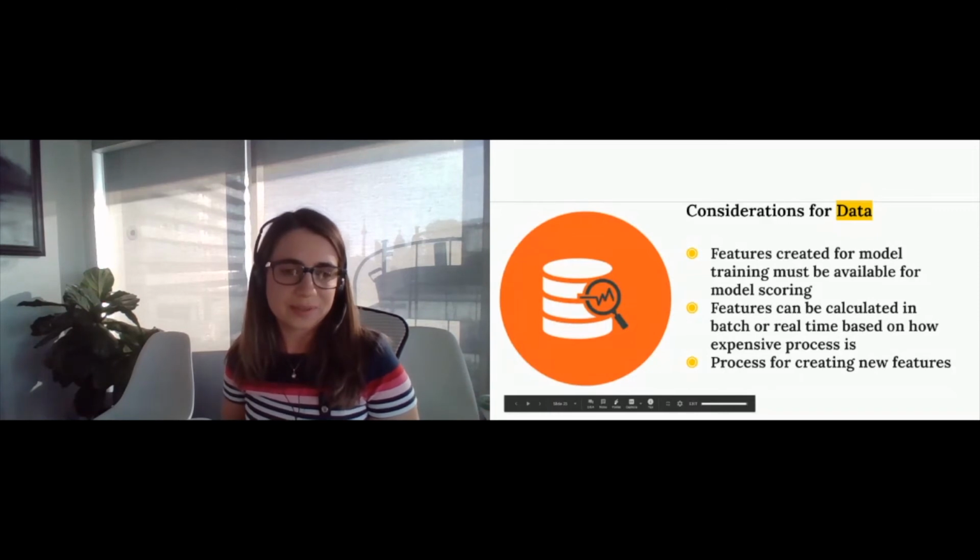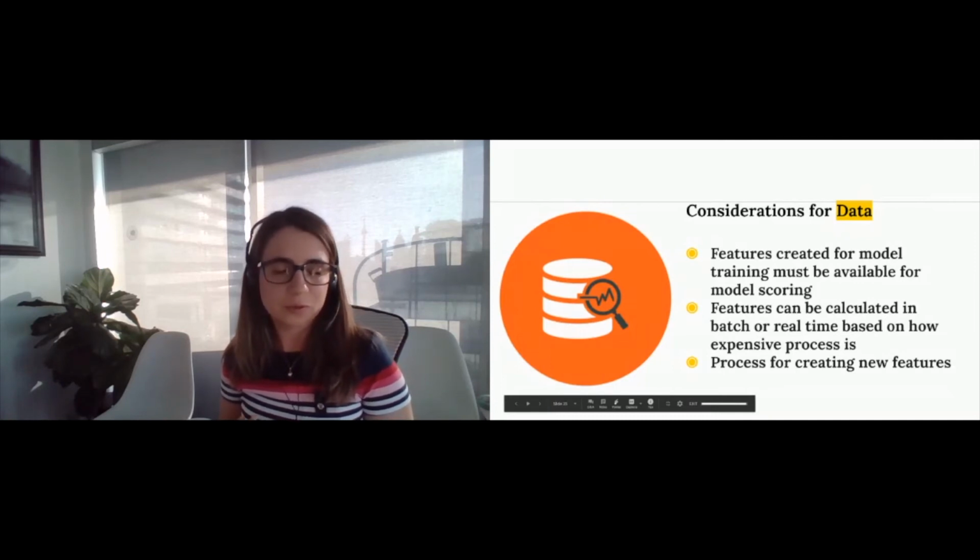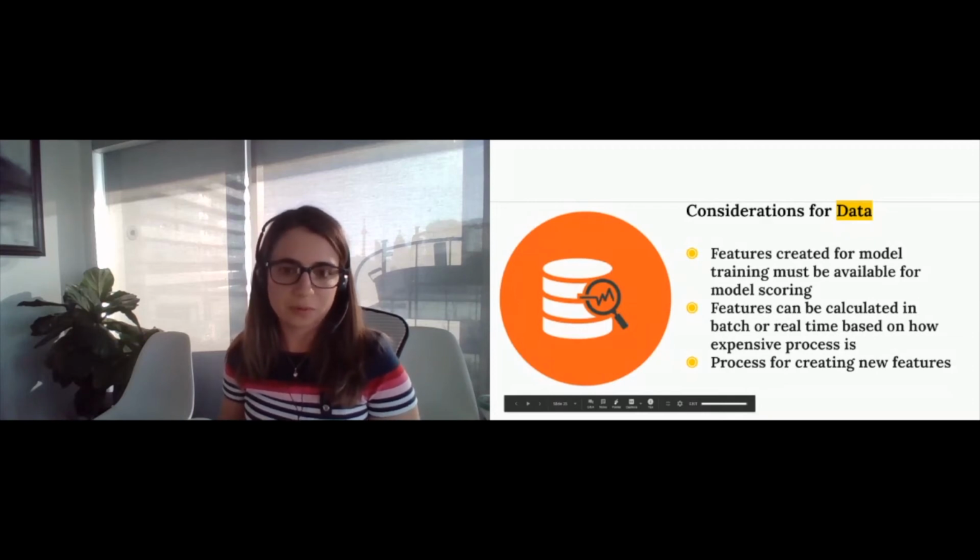Some process around deployment. Again, if you're working with multiple teams, figure out at the very beginning how you do handoffs between teams. What are the sign-offs? Who's in charge of what? If a certain part of the pipeline breaks, who is responsible for fixing it? And again, track the data changes that may be coming either from the application, or from requests from subject matter experts or business owners, and have some sort of tool like Jira perhaps to keep track of who's doing what, and anything like pre-deployment testing and post-deployment testing, making sure that those kinds of tasks are assigned.